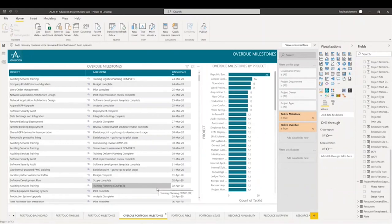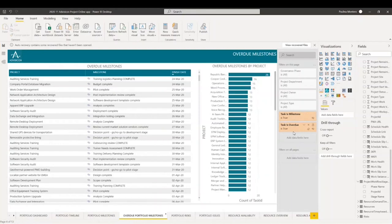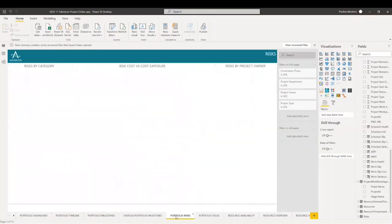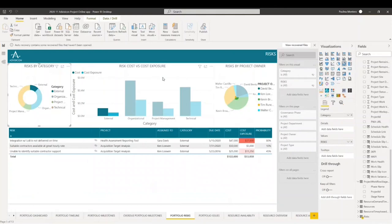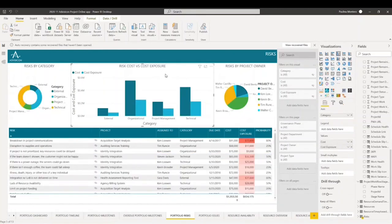For this page, we have overdue milestones — these are past due milestones that have not yet been completed. The page filters are: task is milestone and task is overdue. Next up, we have portfolio risk. This is an aggregated risk across a portfolio and their impact on the portfolio. We have risk by category, risk versus cost and exposure, risk by project owner, and then a table showcasing some basic data about our risk with some conditional formatting.